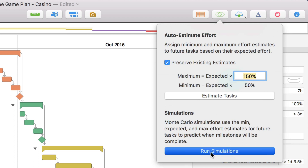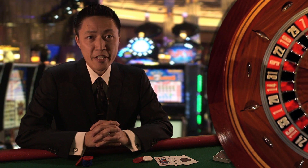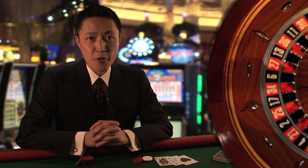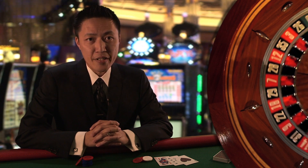Now, let's run the simulations! This takes our effort estimate for each task and spins them on the virtual roulette wheel to compute the probabilities.